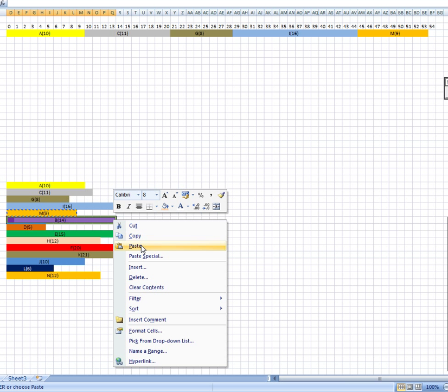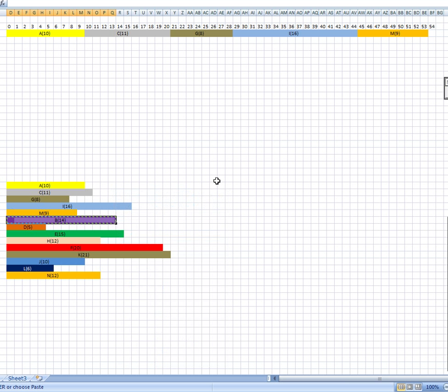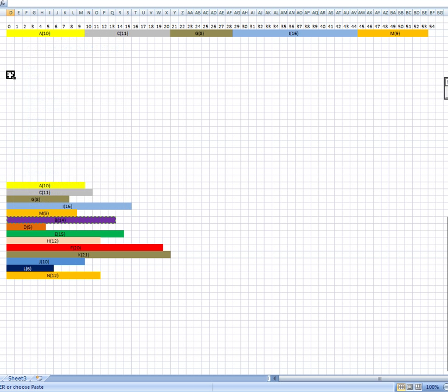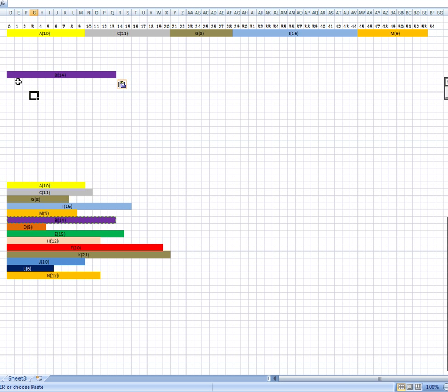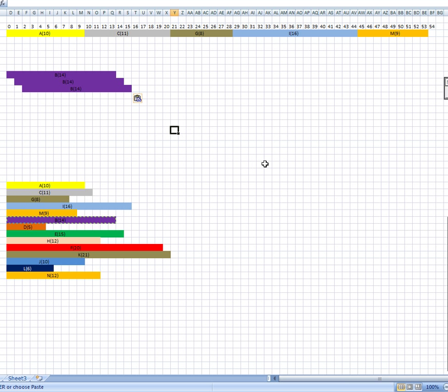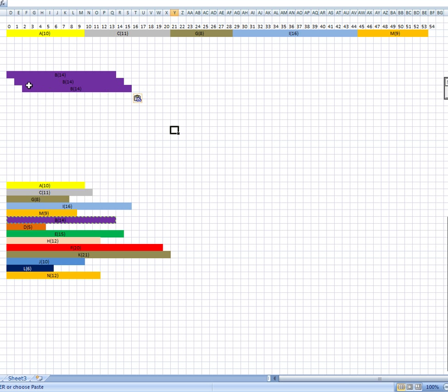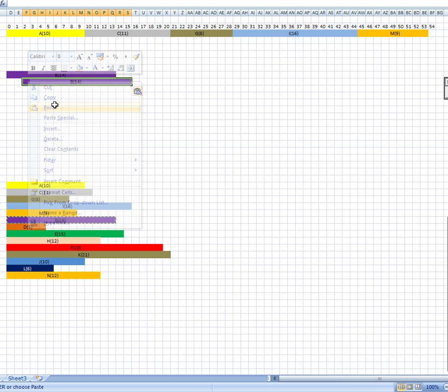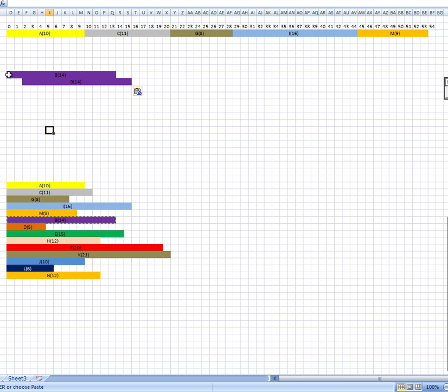So you might say, why did you do one rather than the other? Well, just because I decided to. B, I've got a bit of room for maneuver with B. B can start as soon as the project starts. So I could start B here, just make a little bit of room for space here. But B doesn't have to start that early. B doesn't have to finish until 14. So it actually could start and finish there or there. Now, it could get messy if some of the jobs have about 20 days slack in the system. This has got three different starting and finishing times. If it's got 20 starting and finishing times, it'll take ages to draw it out. So we don't need to draw all of them, just the earliest and latest.